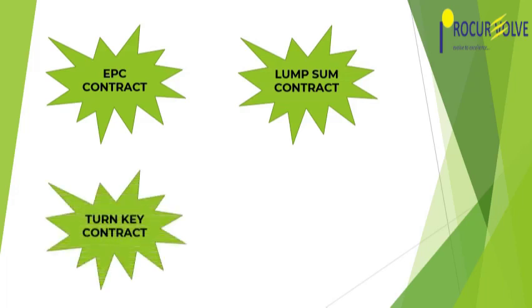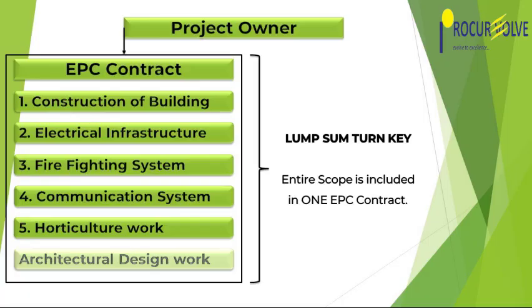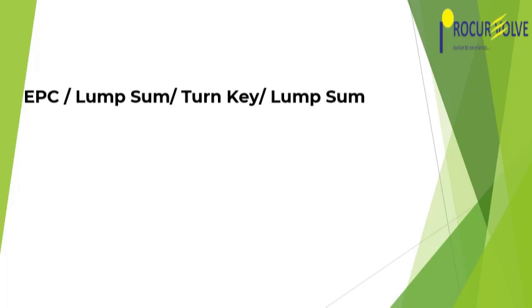Now the disadvantages of lump sum turnkey contract is the project organization has very limited access to the design and engineering activities, quality control activities and the project management aspects, because they are not getting involved in the day-to-day activities. And if the project organization is not having due clarity and they foresee that there might be a scope change, there are very limited avenues to implement major scope changes in the EPC turnkey or lump sum turnkey contracts.